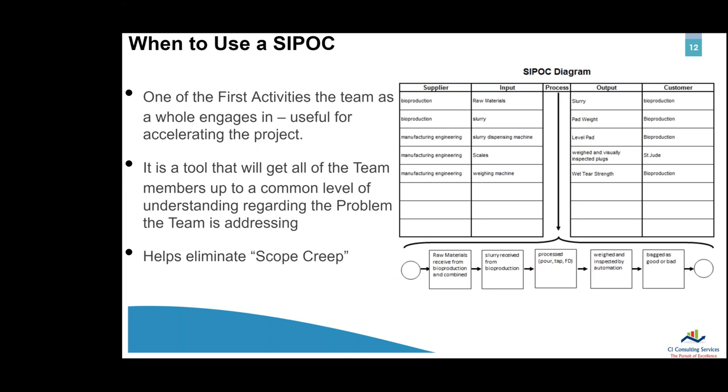Also, to give you a little bit of guidance about when you should be using a SIPOC. And the reality is, in my mind, after you do a problem statement and objective, that would be a great time to do a SIPOC so that people can really understand what's going on. The idea is, too, by building this as a group, everybody understands the problem the same way. And I think that's important.